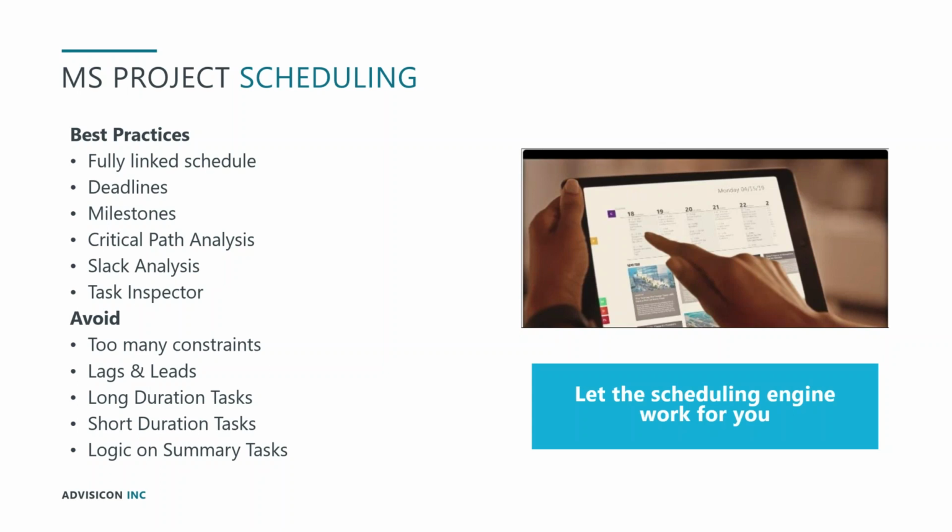We can recognize groups of tasks that contribute to a certain key milestone or that comprise a certain phase or are being done by a certain team. If we link the predecessor-successor relationships on our summary tasks, we can have errors occur through adding things to the flow of tasks that are under that summary task, such that our start and finish dates would be inappropriately modified by the addition of that new task.